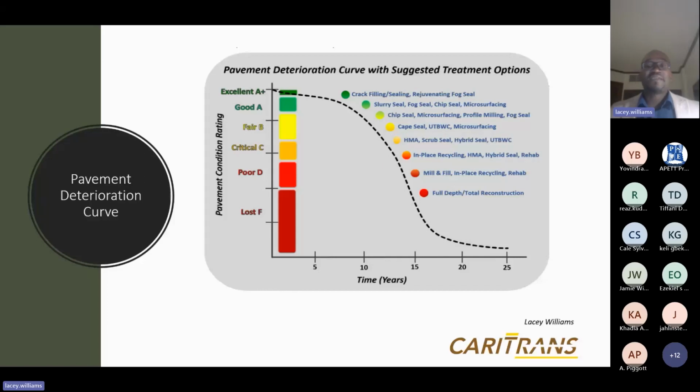The engineer goes on site, has a look, he may do a condition survey, then you decide, okay, this thing perhaps needs some attention. So you escalate it to the supervisor, the director of highways, the permanent secretary, as the case may be. A proposal is done for a project. Perhaps it goes to cabinet, depending on how costly it is, or it may go to the board management committee if it's one of the quasi-state enterprises, as the case may be, some approving authority.